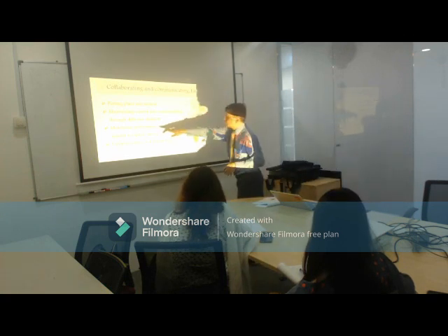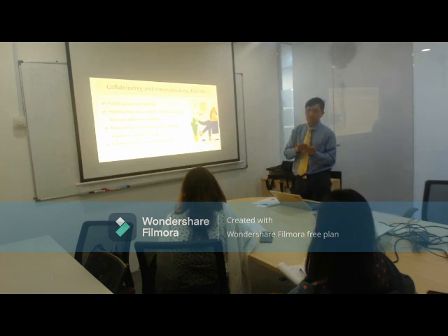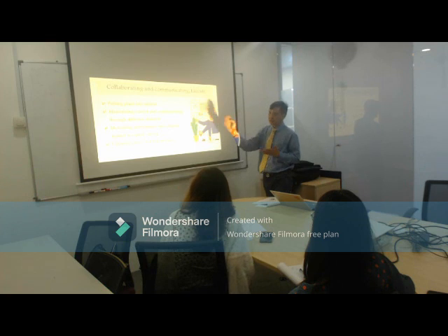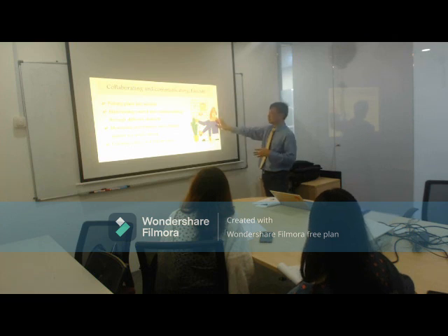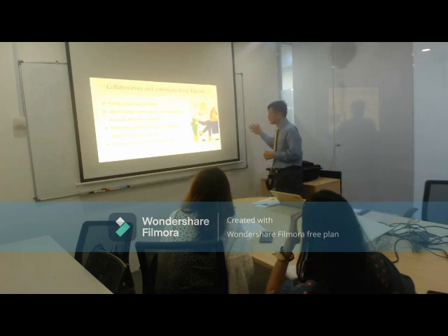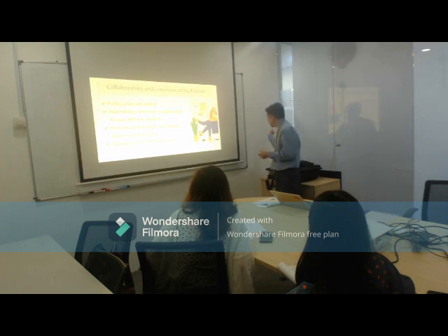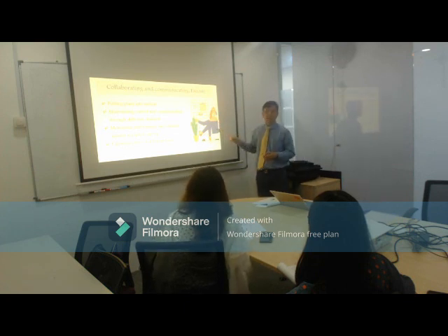Other performance that you might need to have is make sure that the code that you have is the correct paint code, and during the painting they need to be able to paint 3 layers, for example, and each layer they need to have a certain amount of time to let it dry before the next layer. She wants to have good paint quality, because if you have 3 layers, the paint will last you for many years. And if you've got 3 layers but you keep on painting 1 layer, 2 layers, 3 layers on the spot, it's of no use. You have to leave 1 layer dry for 4 hours, paint the next layer, dry for 4 hours, then paint the next layer and dry for 4 hours. She knows it cannot be done within the day.